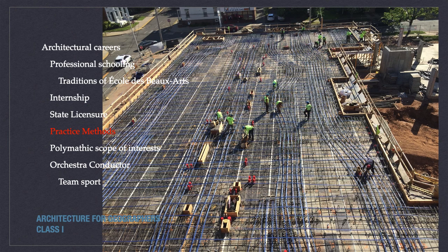Then during the construction administration phase, each month the architect will review the contractor's applications for payment, corroborating that the amount of progress made is correct and that the work satisfies the design intent.